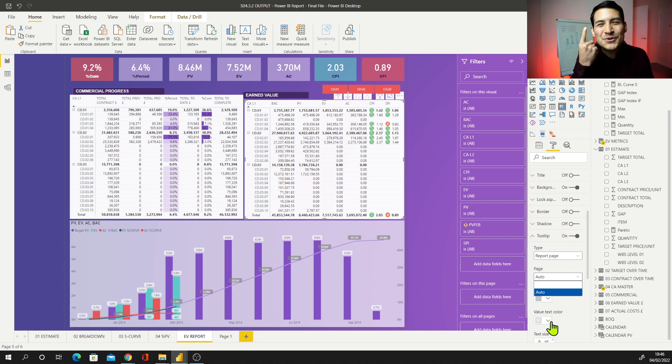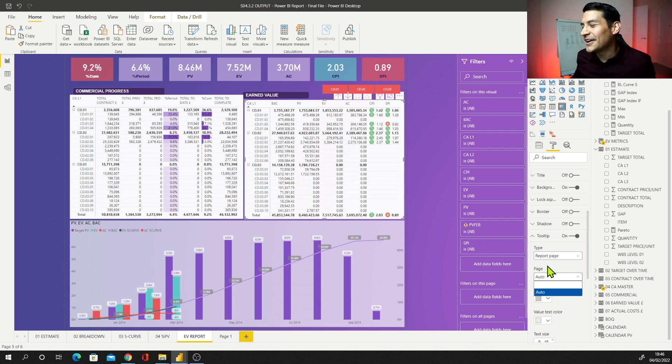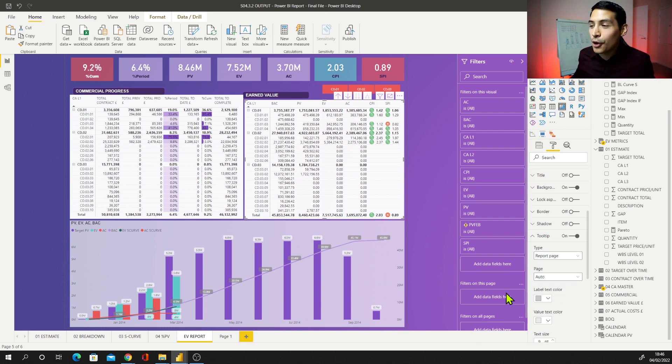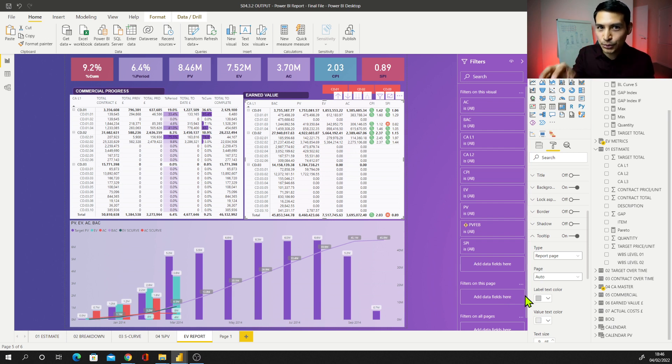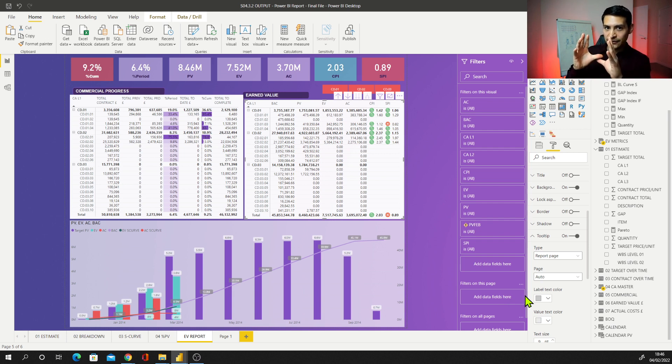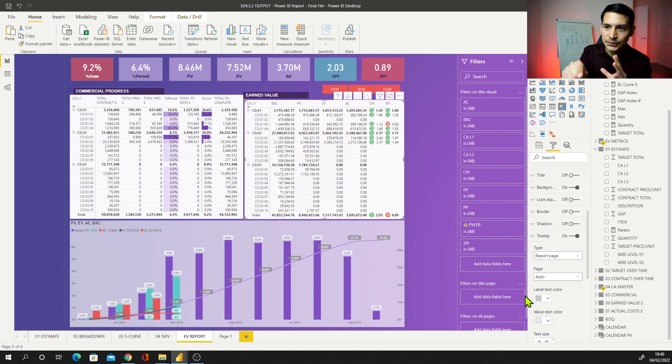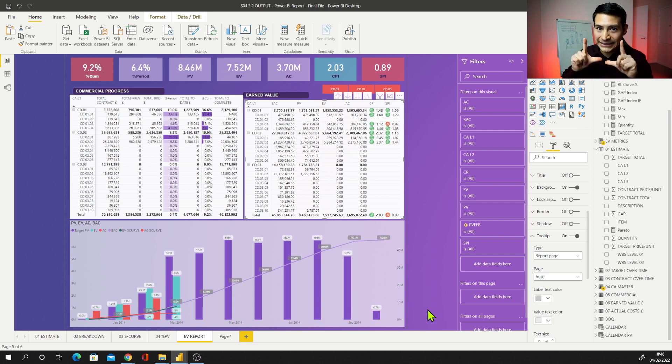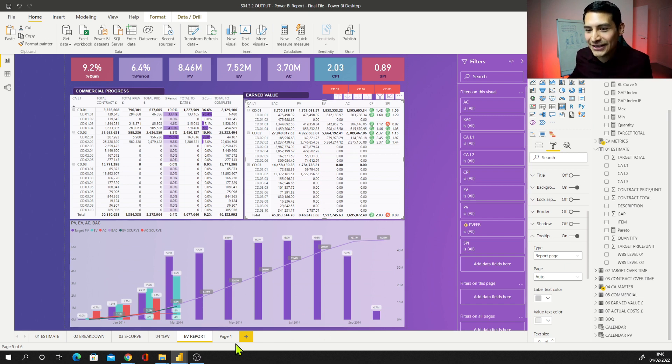So the problem is that I have to say to Power BI that that page number one is on a tooltip size of the page. That's totally fine. But I need to say, I need to determine that that page not only has that size of a tooltip, but also is a tooltip itself. That's the step I missed.